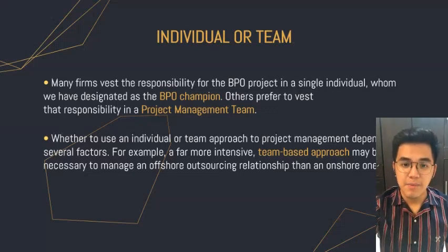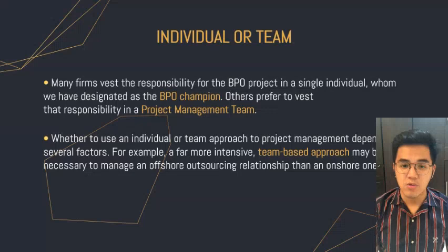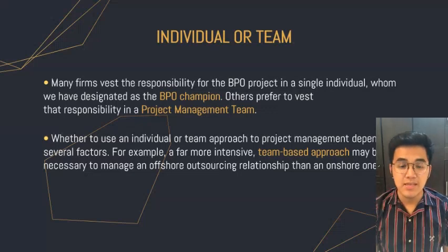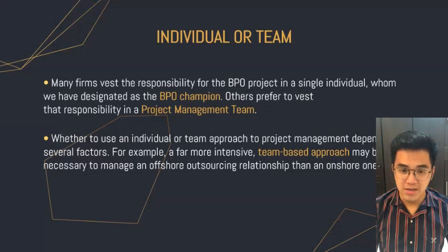However, a team-based approach can lead to problems of accountability if there are no one-to-one links between individuals and discrete project management tasks. That is, even when a team approach is used, individual team members should be assigned clear responsibilities for aspects of the project, and they should have clear reporting channels.